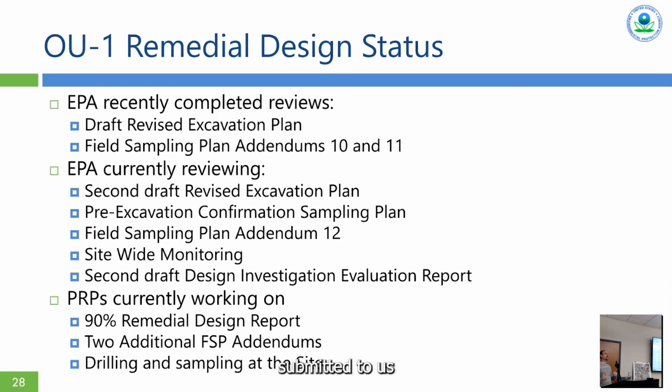It was required to be submitted to us very early in the design process, before they had a lot of the excavation procedures, all the data from the design investigation. So we're working on finishing up some comments to that, but a significant revision to that document will be coming with the 90% RD report, informed by everything we know from the additional data and the excavation procedures that they are working on for the remedial action. But that's everything monitoring.